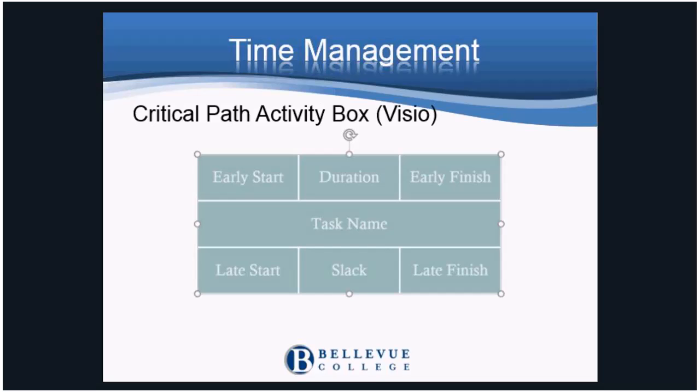The next number is the late finish. Starting from the last job, this is the day number preceding the late start value of the next task. If the next job had a late start of 7, the late finish for this task would be 6.